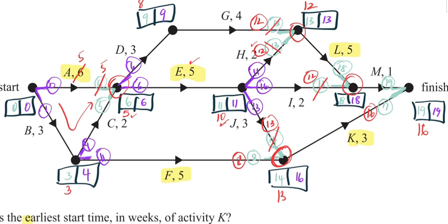Now in order to choose along the other edge, we have to come down along L. So 12 plus 5 is currently 17 without any reductions. And if the choice is between 17 and 12, we will choose 17. But what we want is that this value here plus the 1 over here should be equal to 16.